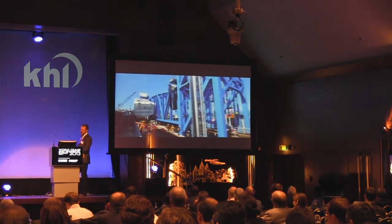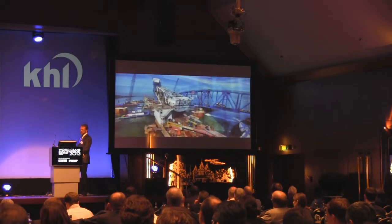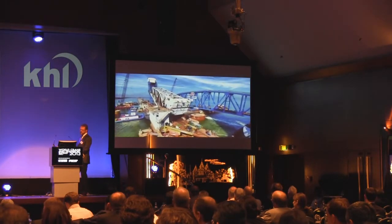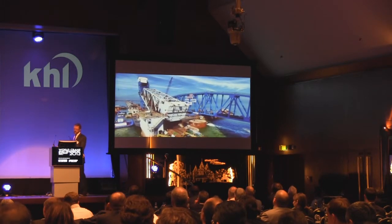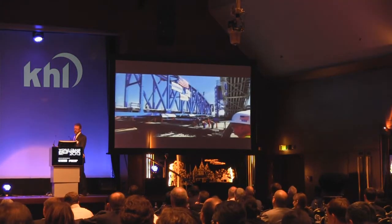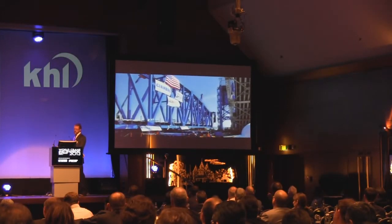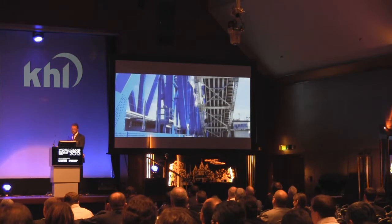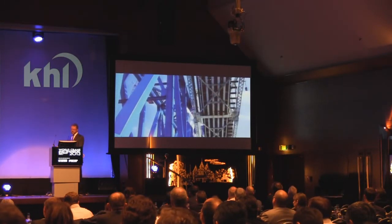Additionally, when the new bridge was on its center line, there was only 17 inches between it and the old bridge. If control of the barge was not maintained, the new bridge could easily collide with the old bridge. The impact of the 3 million pound lift span bridge could not only damage both bridges, but would knock the raised Bascule Bridge off its pivot point so that it could not be later lowered for impending rail traffic.